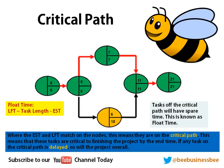In some cases, you may have more than one critical path. Now the way to check if you've got this correct in the exam — if you were constructing one of these — is to see if the path actually flows all the way through. You should always have a path that goes from the start to the finish. If you've got a node that's missing, you know you've gone wrong. The critical path has to run throughout the whole project.